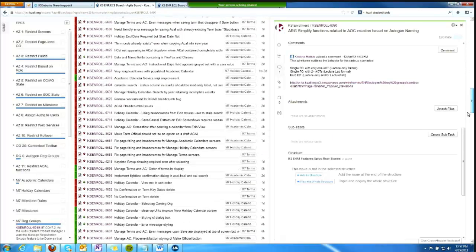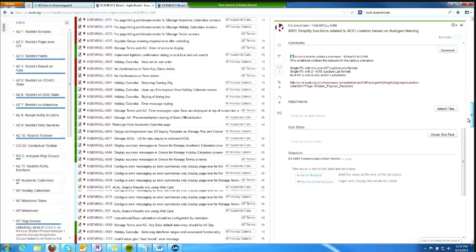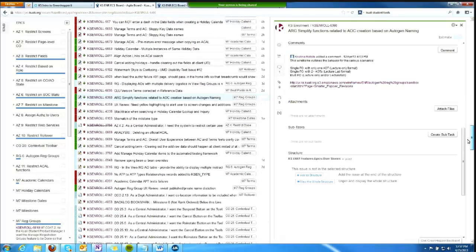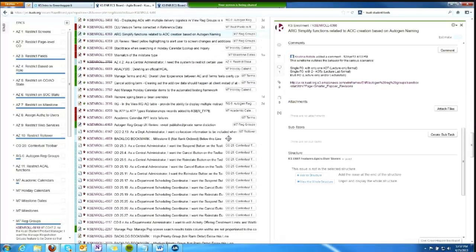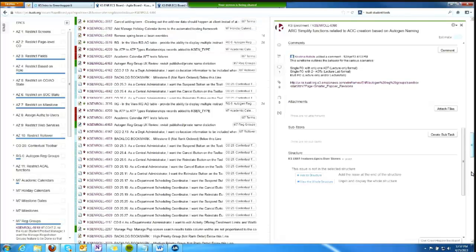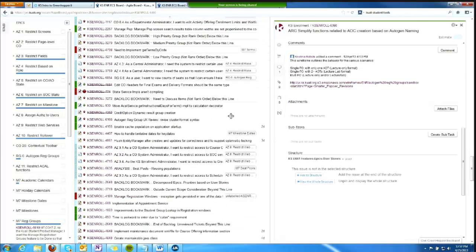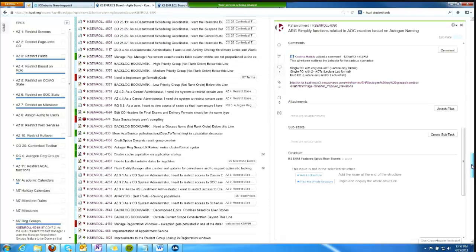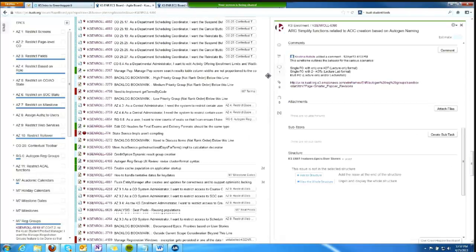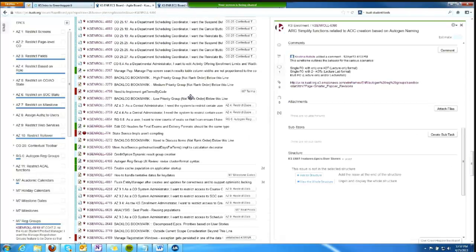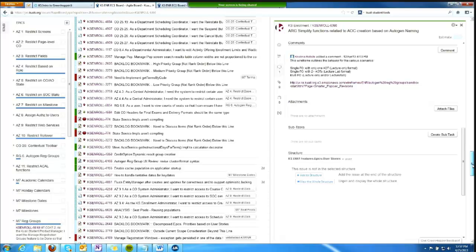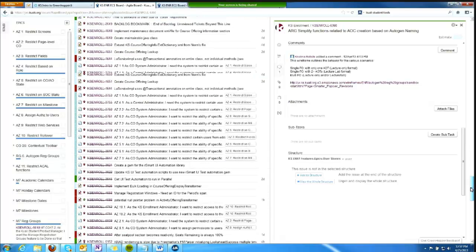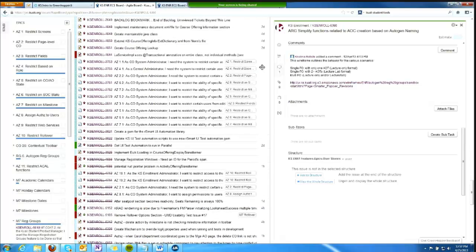Further down the list, scrolling through, we see there's an M8 bookmark. Eventually we're going to get to a series of bookmarks that are things like high, medium, low that haven't been placed in a milestone yet, things that are need to discuss where the product owners or I need more information in order to make a ranking decision, and eventually an end-of-the-backlog item.